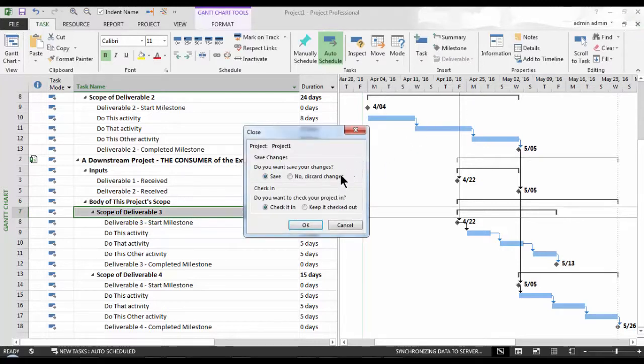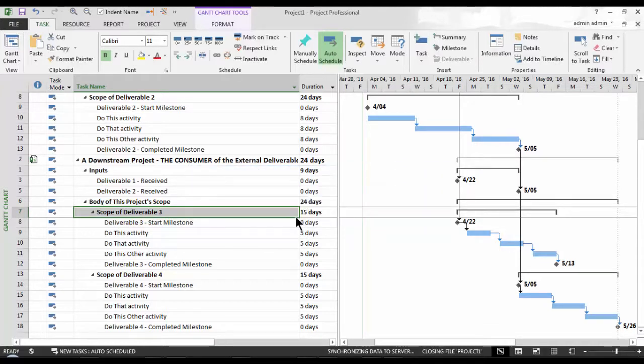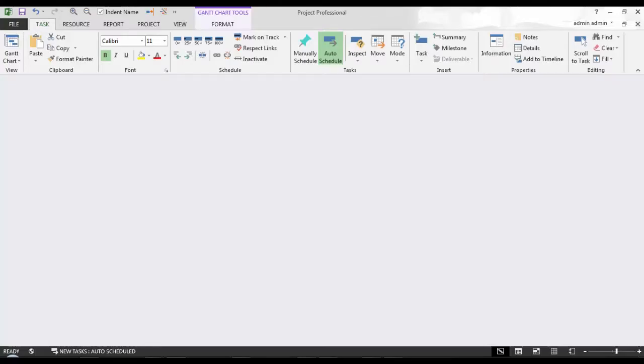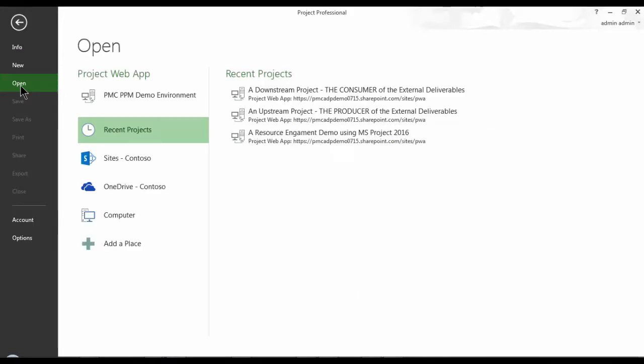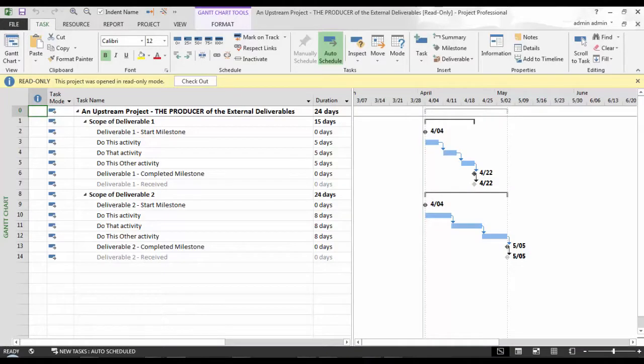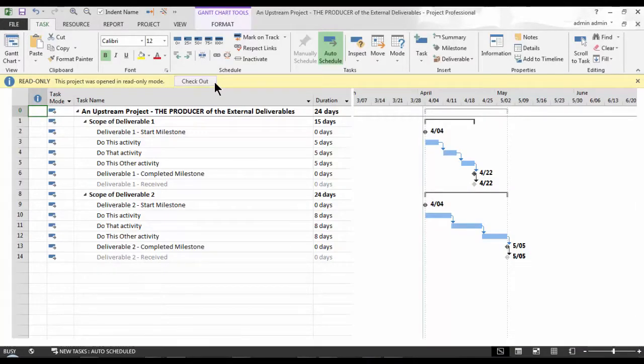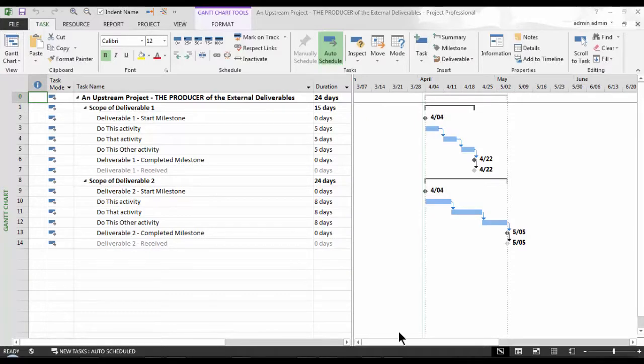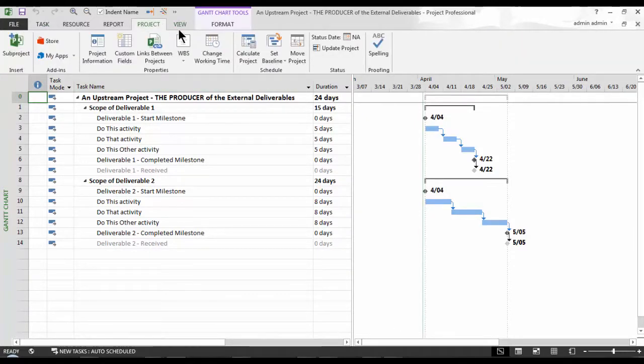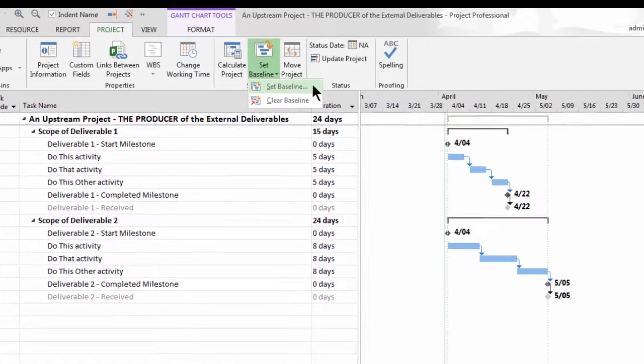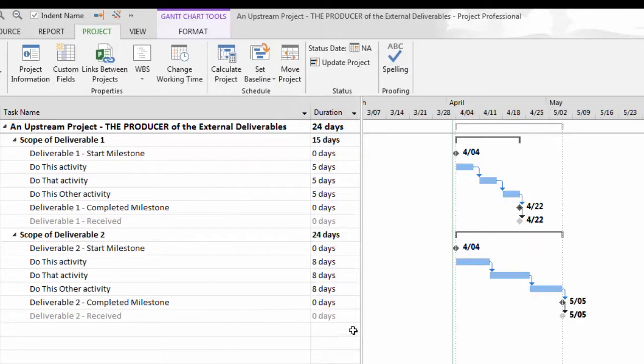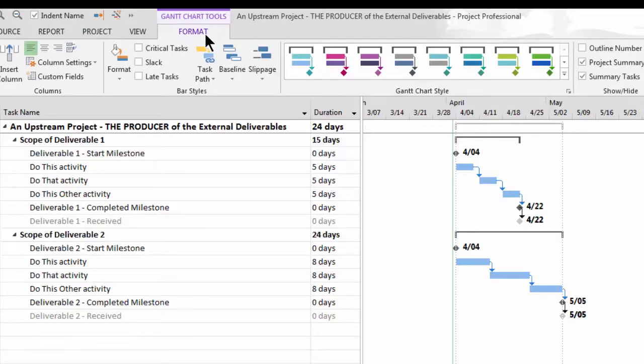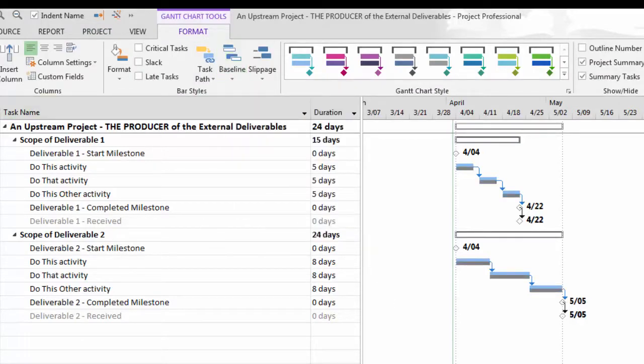Now, allow me to open up the upstream project. I will check it out so I can make some edits. I will save a baseline here to mark this as my standing commitment. In PPM, I can secure my baseline so that only authorized personnel in the PMO can set them to ensure that they are not inadvertently changed. I will also use the baseline drop-down button here in the bar styles group within the format ribbon to allow us to see the schedule against our baseline. This will make it much more apparent if there is a deviation or variance between what was committed and what is scheduled.